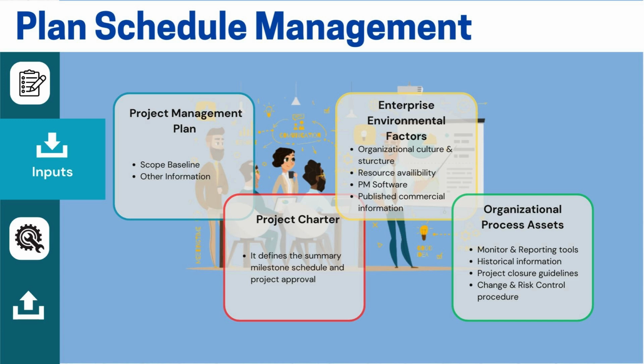One important document is the project charter, which provides key milestones. For example, when am I supposed to complete the requirements specification document? When should I finish the high-level or low-level design or the build activities? What is the deadline for UAT sign-off, business acceptance testing, or user acceptance testing? These key milestones are crucial for the project and come from the project charter.